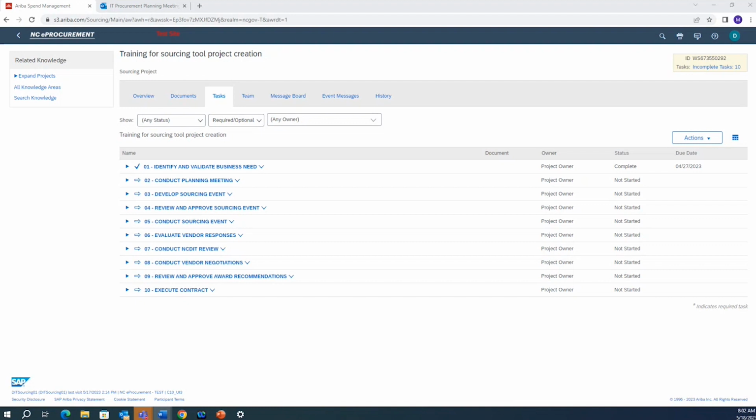If the agency determines that a meeting with NCDIT is needed, the agency procurement office will use this task to schedule a meeting during the recurring meeting times on Tuesdays between 4 p.m. and 5 p.m. Stakeholders and roles associated with this task are the agency CIO, agency IT, agency procurement, IT security, privacy office, legal, NCDIT ESRMO, NCDIT EPMO, statewide IT procurement, and statewide DOJ legal.